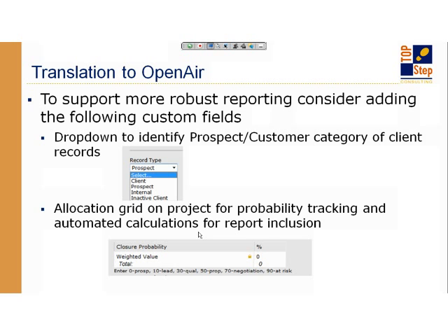Well, the same can apply in the OpenAir system. So proposals that come in, it's a proposal. A $1 million proposal does not necessarily mean you're going to get $1 million. There's still negotiation that has to happen, and a determination of how the project will potentially be started. So you may want to consider adding a weighted value in the reporting within your OpenAir system. And one of the easier ways to do that is this field called an allocation grid, because what it allows you to do is introduce a whole other set of fields to be included on reports, essentially setting this percentage field.